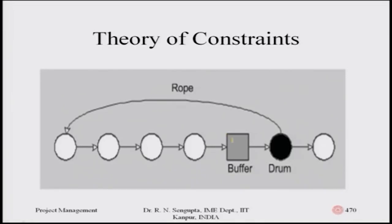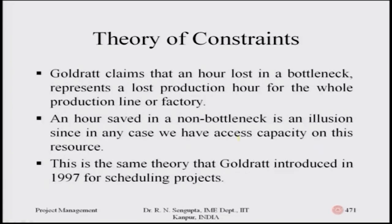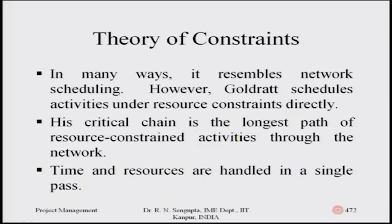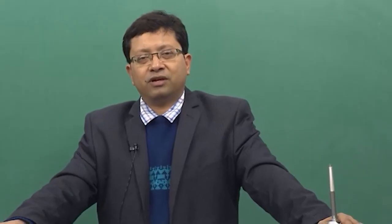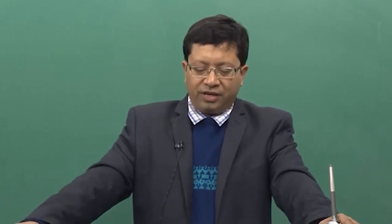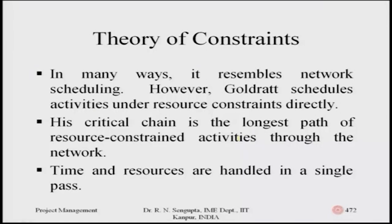The drum-buffer-rope concept: the yellow highlighted buffer has a consequence on the drum and how feedback happens. Goldratt's critical chain resembles network scheduling — it is the longest chain of resource-constrained activities throughout the network. Time and resources are handled in a single pass, making it a practical improvement over traditional PERT and CPM approaches.